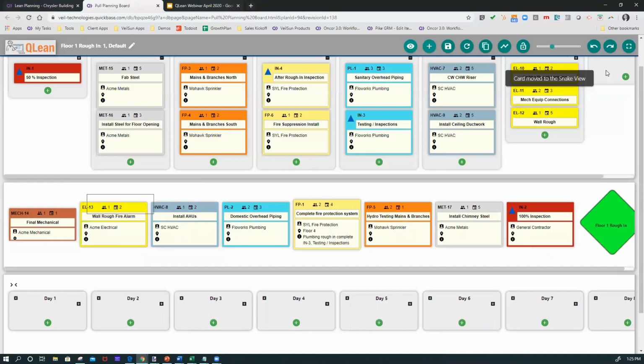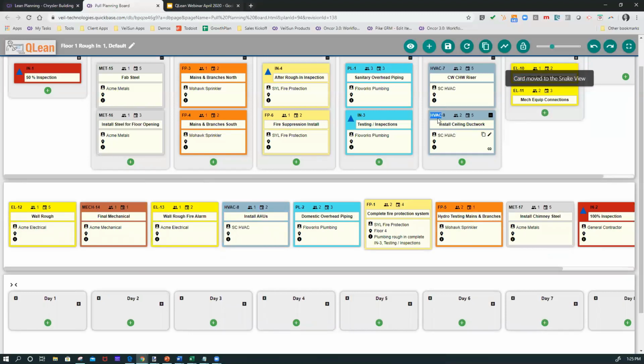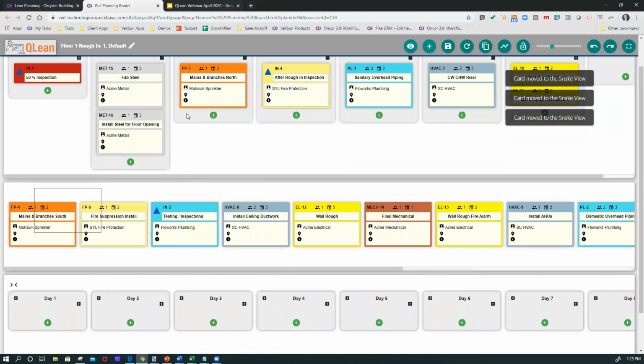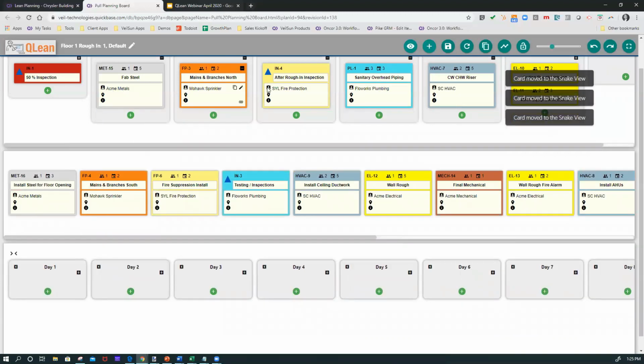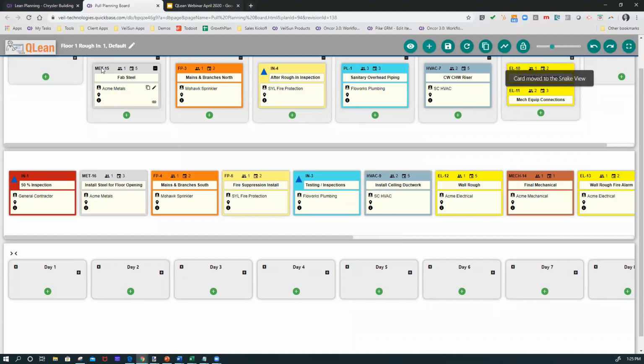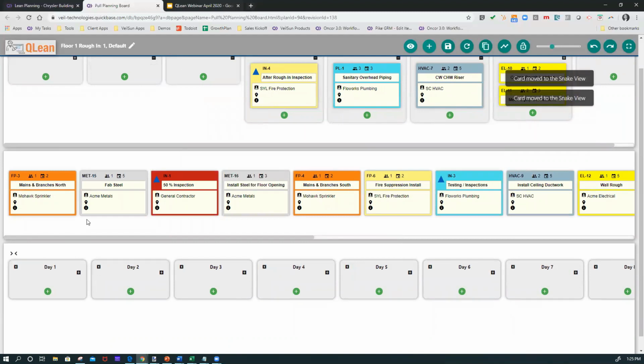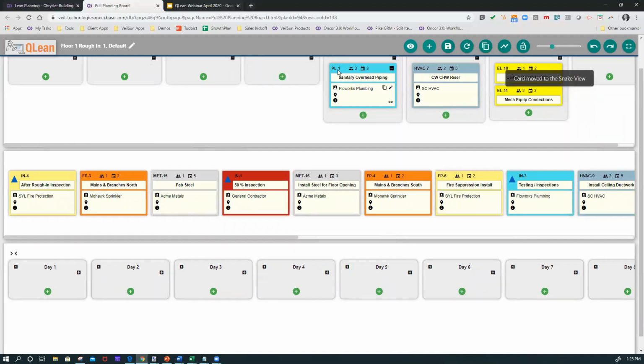The idea is that you're going back to front in order. And for the non-pull planners, it's really like what absolutely has to be needed in order for that task to be done. So it's going backwards in needs, and it's not worrying about what can be simultaneously done. Yep, that's correct. If something is simultaneously done, you handle that in the next steps. You just put them in a similar order.